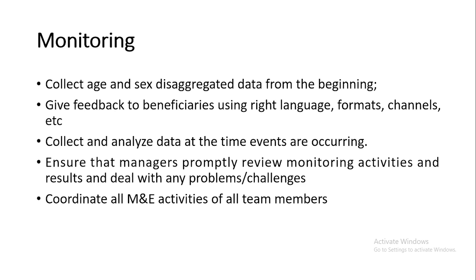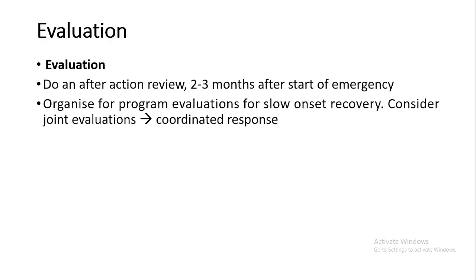Collect and analyze data at the time that the events are occurring. Ensure that managers promptly review the monitoring activities and coordinate. Make sure to coordinate all the activities all the team members are doing. So you're coordinating, making sure the activities are done well and met. And in evaluation, you can do an action review two to three months after the start of the emergency, because these are more like short-term projects, but also something you have to respond to immediately. So after three months, you can do an evaluation.